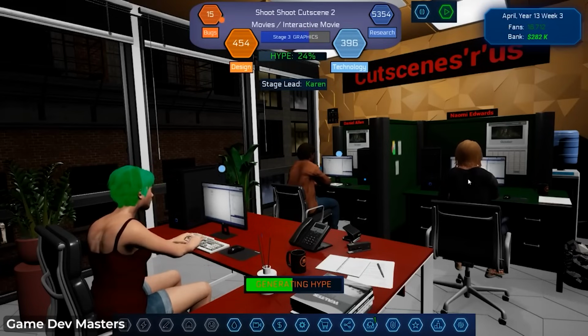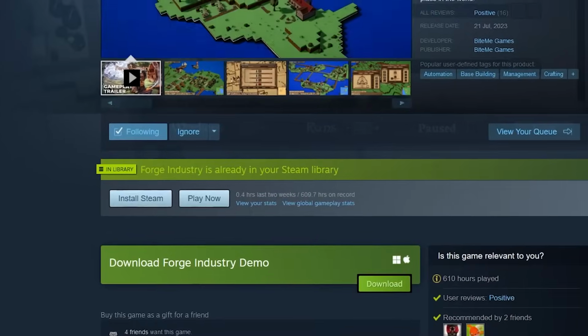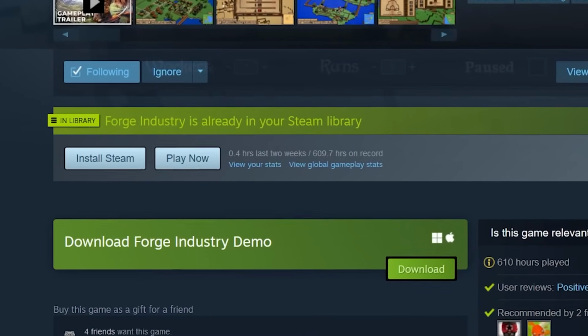So what I want you to do now is take the date we are today and then plan 9 months or however much in the future that you think is feasible for you. When are you going to do your first public demo? You should do a demo before you launch your game. It's going to be critical in getting both wishlists and getting feedback about your game. So that should be your main goal to build towards.